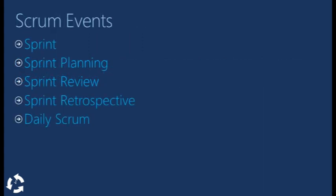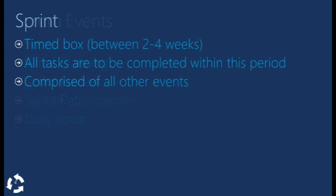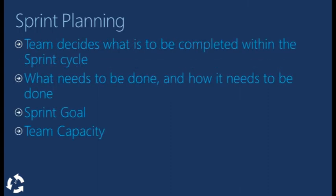Now a breakdown of the Scrum events. Sprints are periods of time between two to four weeks that contain all the following events. The sprint planning meeting is when the team decides what will be completed in that sprint, the goal and the capacity of the team.